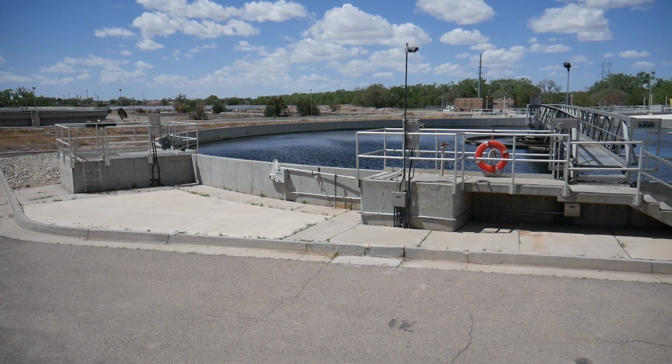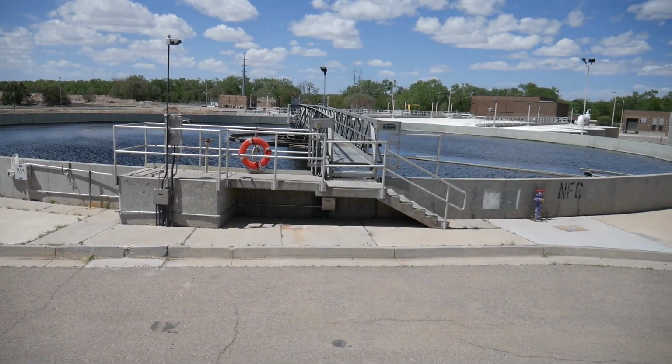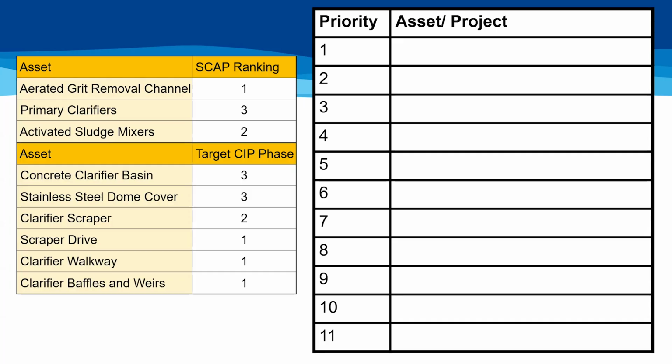The clarifier walkway is a safety concern, and operator safety should be the number 1 priority for any plant. Since the risk of a failed clarifier walkway can result in a major injury or even death, that will be priority 1 for our CIP.